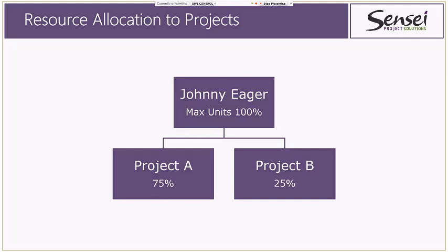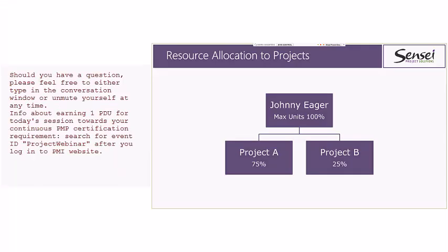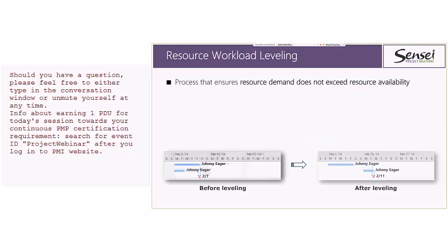And there are some slight differences here, whether you're doing it on the desktop only or against an enterprise environment, which we'll explore as well. So just keep that in the back of your minds as we go through this. All right, so what is resource workload leveling? Resource workload leveling, in a nutshell, is a process that ensures that the demand on your resources doesn't exceed their availability.